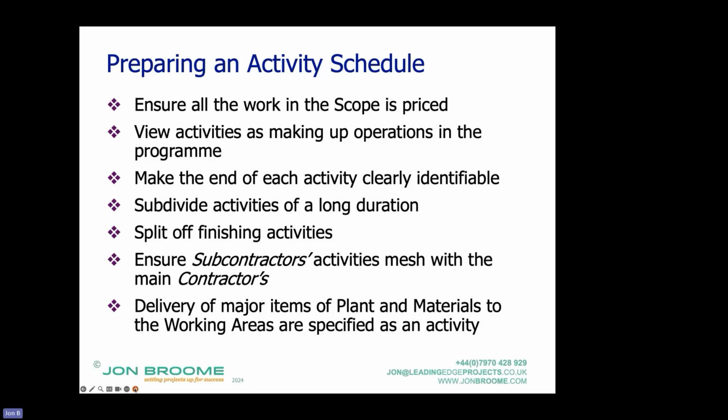As I said, make sure the end of each activity is clearly identifiable. You don't want any questions. You just want tick, it's finished. Subdivide activities of a long duration to do that. Split off finishing activities. So, if you like, the 10% which take 20-30% of the time. So if there's one area to focus on, it's break that down.